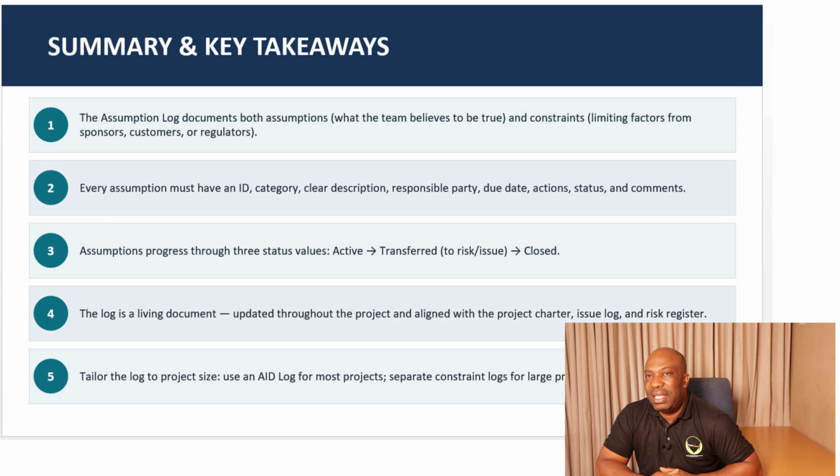Then the second takeaway is every assumption must have an ID, category, clear description, responsible party, due date, action, status, and comments. We have covered these ones. We must always have a well-documented assumption log. Now, our takeaway number 3, assumptions progress through 3 status values.